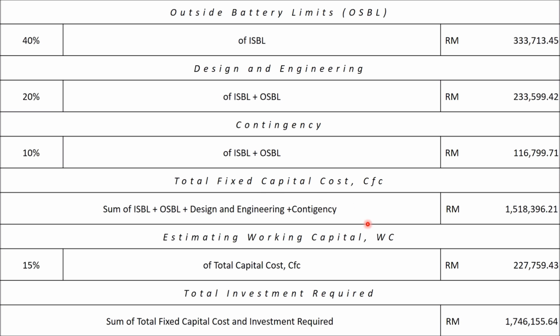Then we will calculate the estimated working capital, which is 15% of the total capital cost. And lastly, the total investment required for this project is RM 1,746,000.